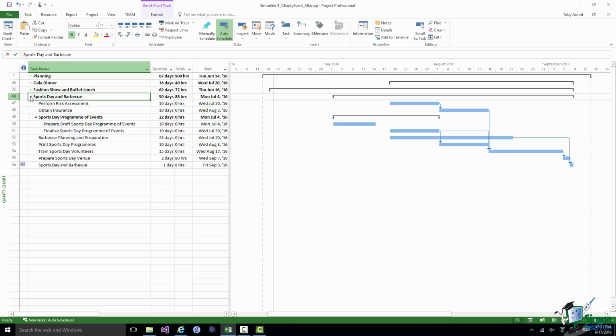Well, as you'll know from your current knowledge of Microsoft Project, when you're dealing with editing a single MPP file, if our 4 project managers each want to work on it at the same time, that becomes very, very complicated, particularly if, say, they all want to work on it at home, they don't have some kind of shared access, and they're going to need to be phoning each other up and saying, if I send you the plan, I want to change that bit, you want to change this bit, have you changed that, I need to change the link from my task to your task, and so on.